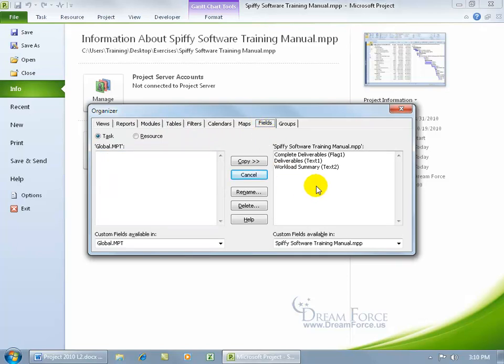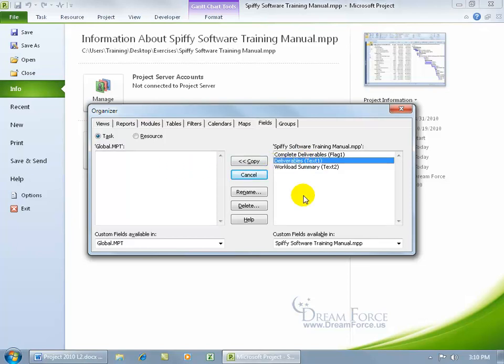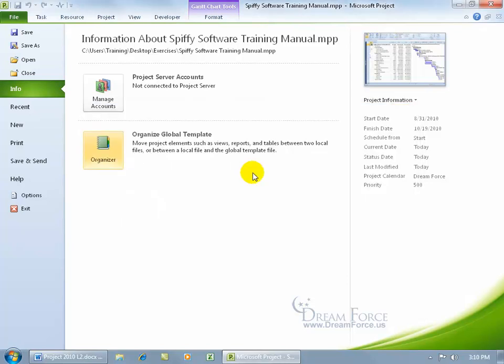Remember, in an earlier training video, we created custom fields. Well, they're available in this project, but not available in all new projects. So if every time I create a new project, I want to be able to have the Deliverables custom field available, select it, click Copy, and any time I create a new project, let's go ahead and close out.